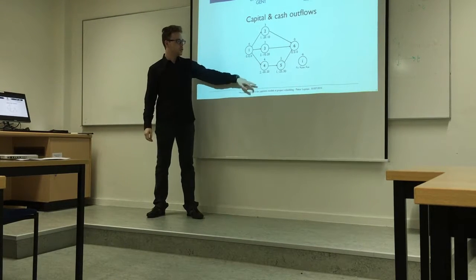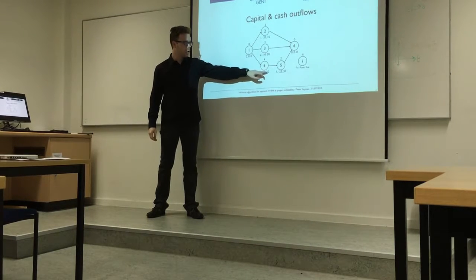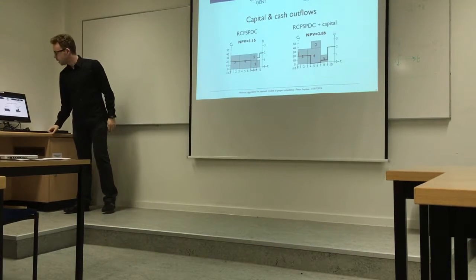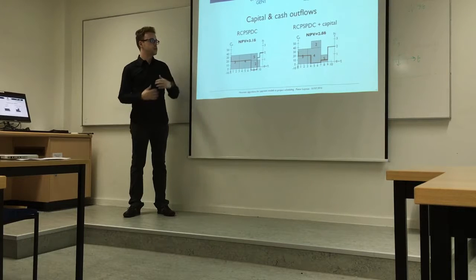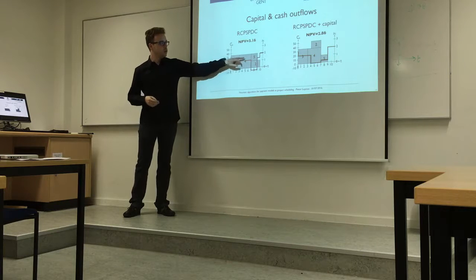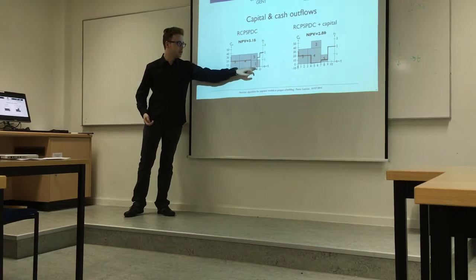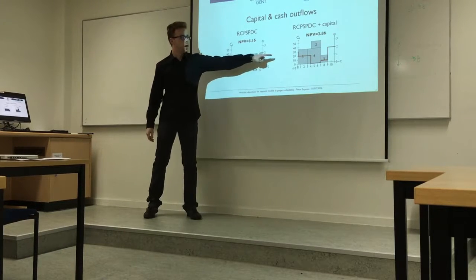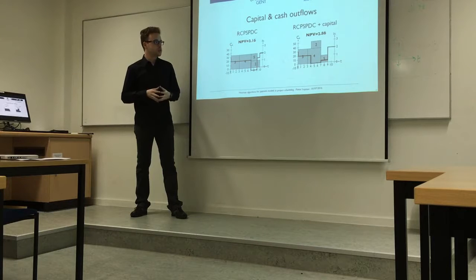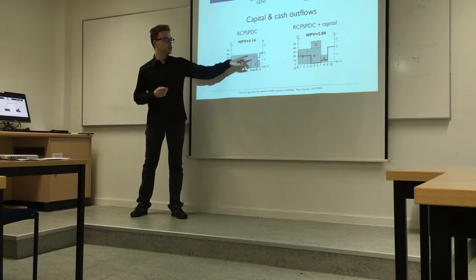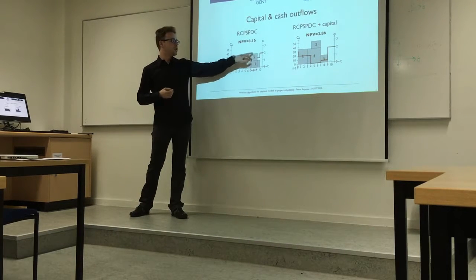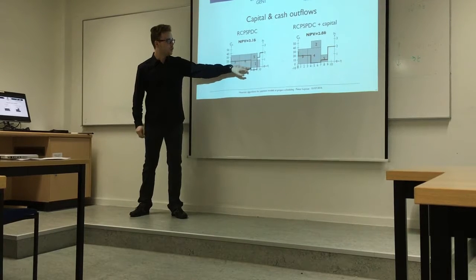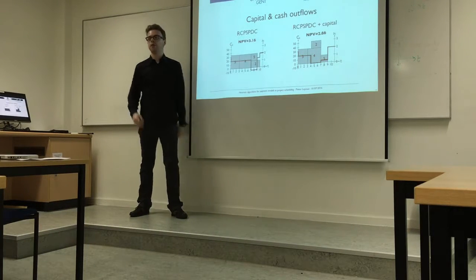To illustrate with a simple example: given durations, renewable resource demands, and cash outflows and inflows per activity, the left-hand side shows the optimal RCPSP schedule ignoring capital. The bold line marking capital actually goes negative at certain time units. On the right-hand side, the capital-feasible optimal schedule is shown, where activity 2 is advanced so that sufficient capital is available to start activity 5.